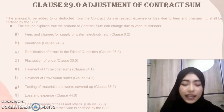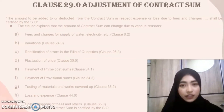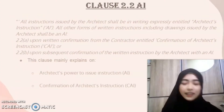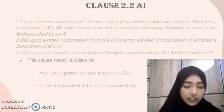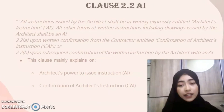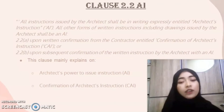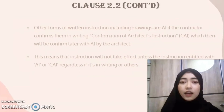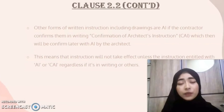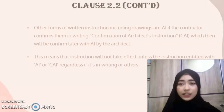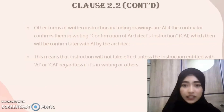It means that the SO is the only one who has the power to certify an adjusted contract sum. Next is Clause 2.2 - Architect's Instruction. This clause explains that all Architect's Instructions must be in writing and titled 'Architect Instruction.' It mainly explains the architect's power to issue the instruction (AI) and the confirmation of Architect's Instruction (CAI). Other forms of written instruction including drawings are AI if the contractor confirms them in writing as CAI, which will then be confirmed later with AI by the architect.